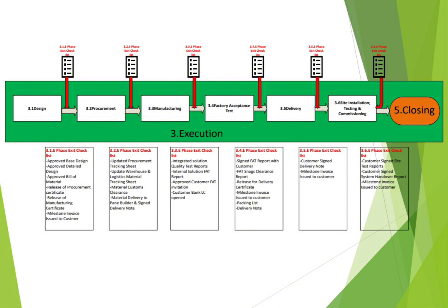Also the lead times, when the material will be available, so that you can match your baseline time schedule, or if there is any material delay where you need to update your schedule and inform your customer immediately about this impact of the delivery.